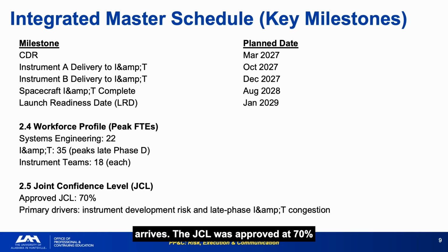The JCL was approved at 70% confidence with instrument development risk and late-phase INT congestion as the primary drivers. Both of those drivers are about to materialize. The case study has been structured to test exactly that.